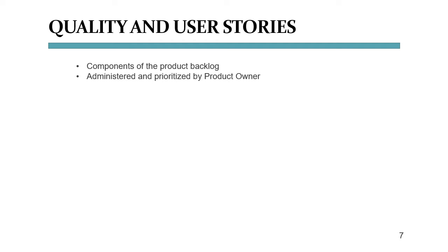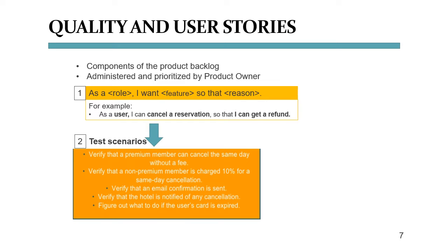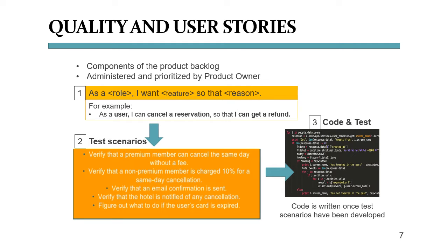Most importantly, just like many things in project management, user stories follow a certain structure. Based on this structure, developers will start building quality into the process by writing the test scenarios and test cases first. That way, they will really know how the user wants to use the product, and they will engineer the product in such a way that it will pass the test cases. This makes it more likely that they will have built the right thing from the beginning and can devote their time to making it work correctly every single time it is being used.